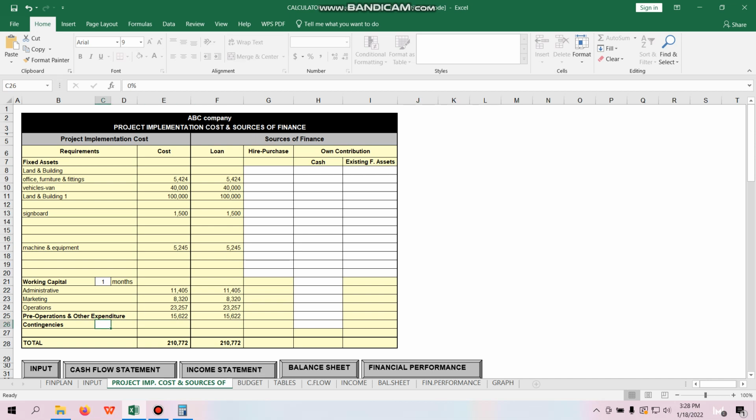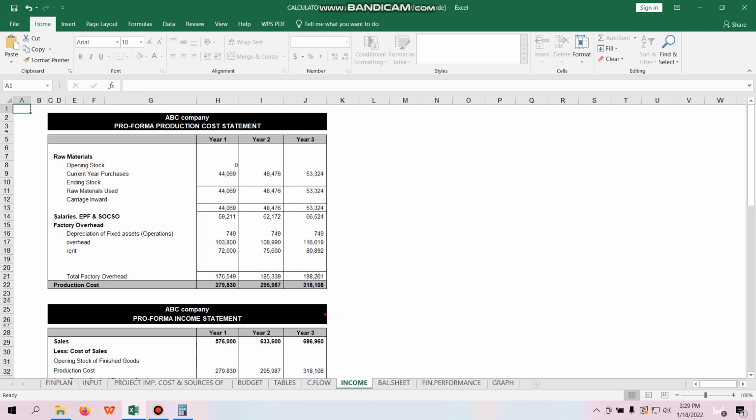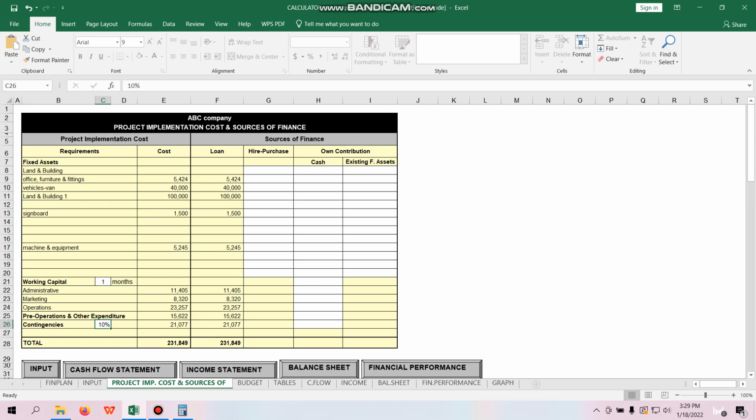In terms of contingency, I told you that this must be set at maximum 10% of the total that we have here, 210,000. Okay, you may refer to my previous lecture. I said maximum is 10%. Contingency is like you're providing the backup. The original number is here, which is 210. So you take 10% from that 210, it's going to be 21,000. You sum up the 21,000 plus 210,000. This will be the new cost of doing the business.